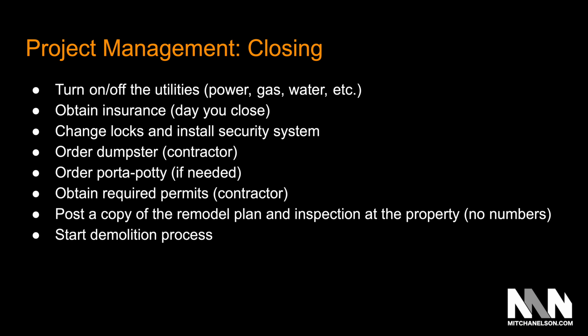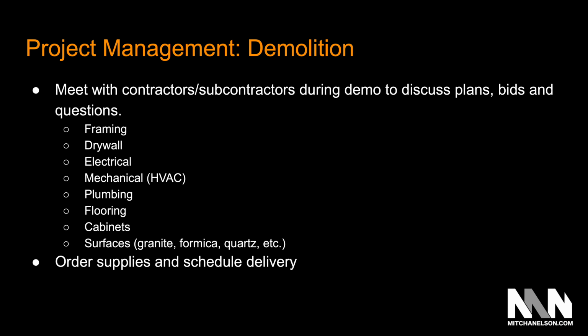So make sure that there's no numbers on it, but do post a copy of the remodel plan and the inspection report at the property. And then start your demolition process. Once you've started the demolition process, then you're going to meet with the contractors and the subcontractors during that demo process to discuss your plans, your bids, and any questions that you or the contractors have, and giving them answers